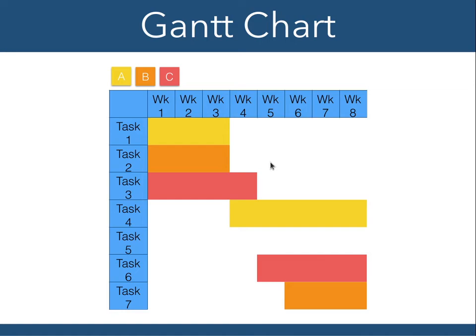One of the things that I really haven't mentioned is that some people would say you should always put possible overruns into these Gantt charts if you draw them, and actually build those sort of possibilities for things to go wrong in. And if you're dealing with really time-critical problems, then yeah, absolutely, that's the way to go. But fortunately, most academic software development projects are not truly time-critical. You're simply trying to make sure that everything that is absolutely crucial gets done by about the right time.